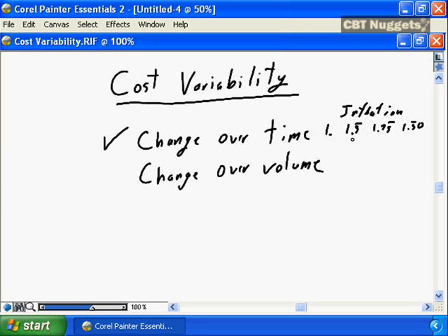If you need to buy technology, if your project is going to involve buying computers over the life cycle of your project, with the cost curve for computing power, chances are buying computers later in the project life cycle will cost less than buying computers early in the life cycle, simply because the cost curve for computing technology is continually going down, is continually favoring the buyer as opposed to the seller.